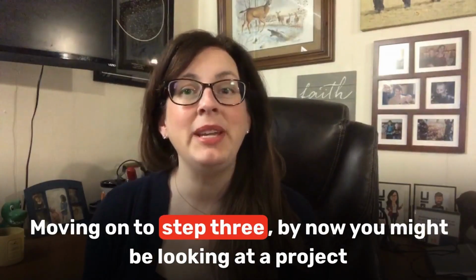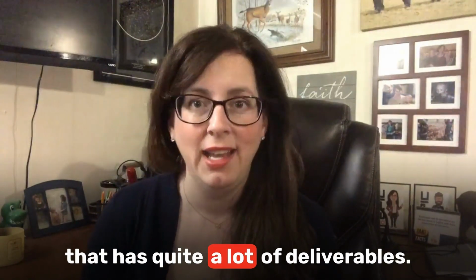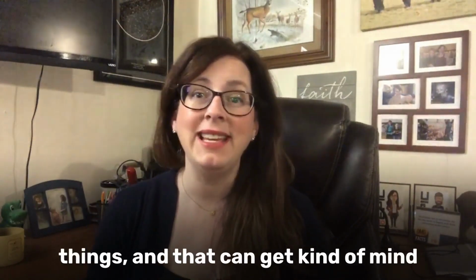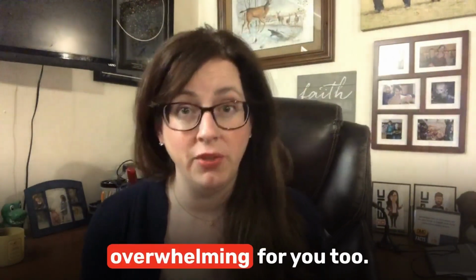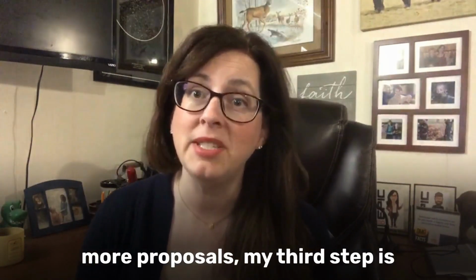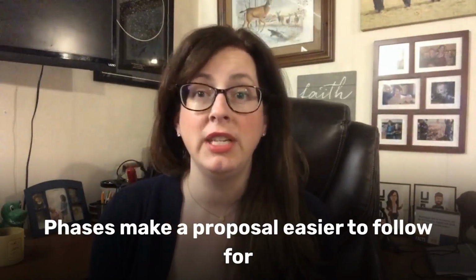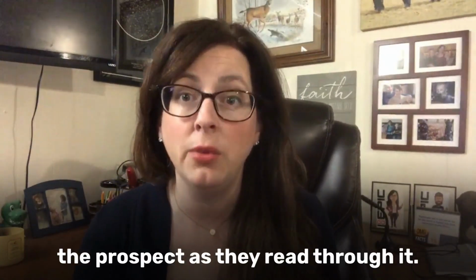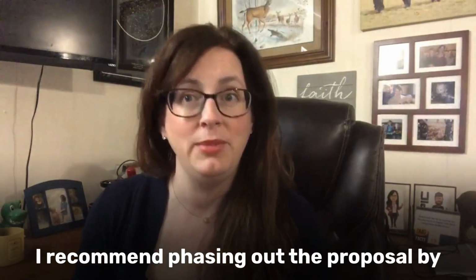Moving on to step 3, by now you might be looking at a project that has quite a lot of deliverables. It could be a hefty list of things, and that can get kind of mind-numbing for the client to go through. It can be kind of overwhelming for you too. That's why for 5-figure and more proposals, my third step is to break down the proposal into phases. Phases make a proposal easier to follow for the prospect as they read through it. I recommend phasing out the proposal by the strategic objective.